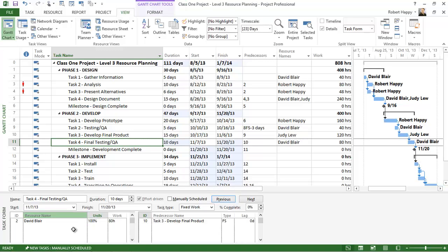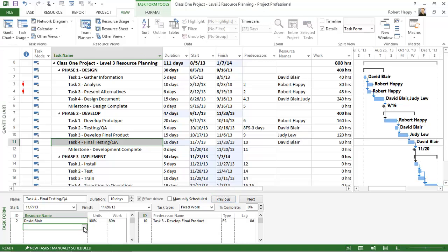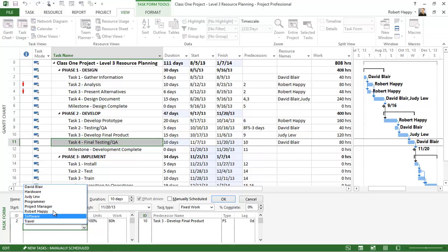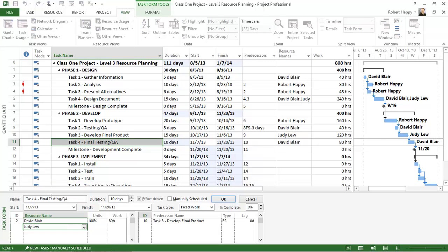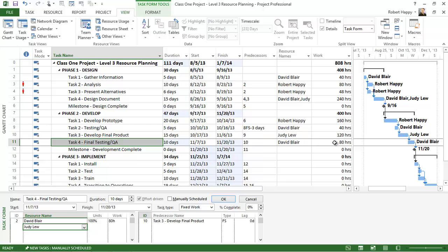If I come down here and I assign an additional resource, say Judy, and I click OK, what do you think is going to happen to the work and the duration now? Well, remember the work is fixed, so it's going to split the work between us and therefore bring the duration down.